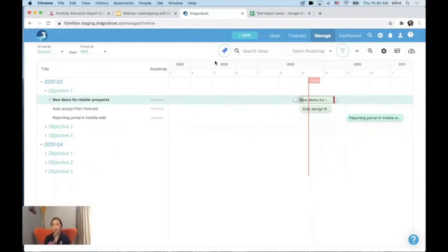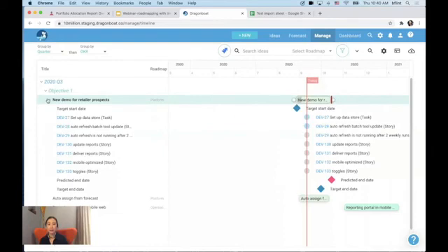The first baseline will then go to Jira so that your team can start to break down the story and start to execute. As your team starts to break down the story and execute, we in program management do need to track: are we on track? Are we behind? It's very hard to track these things. So for us, you can actually track those things right here. It shows you exactly feature by feature, because your stakeholders don't really care about your sprint burndowns, right? What they care about is, when would this feature make the date that you mentioned to us earlier? As you connect it to Jira, you can see that the timeline is different from what you planned.